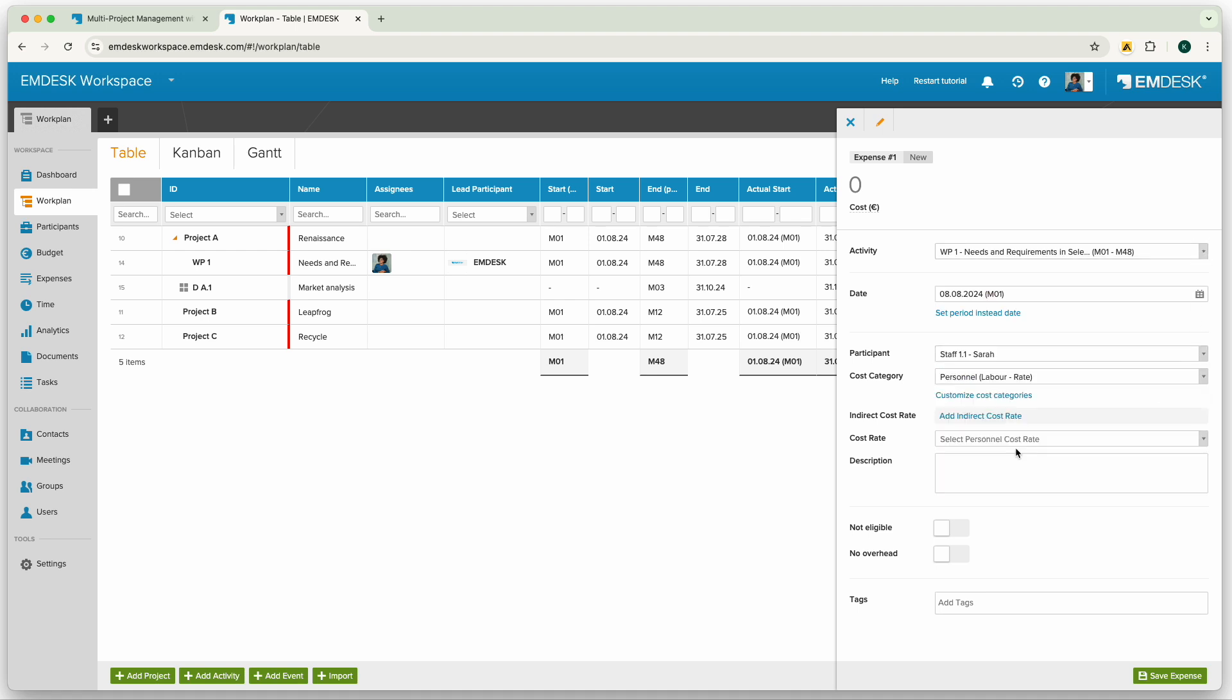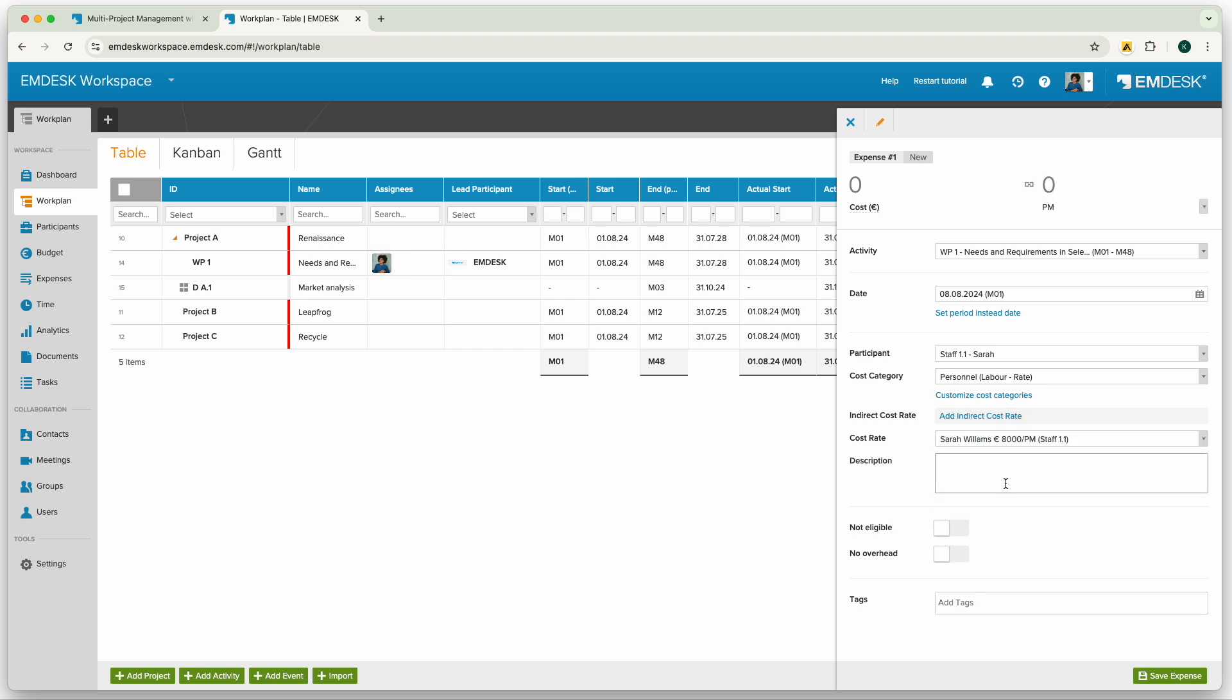Now I've selected personnel cost category so I'm able to select the cost rate and the time worked. As I'm reporting hours worked based on the rate of my participant, you'll see that the cost automatically is calculated as soon as I enter the effort.